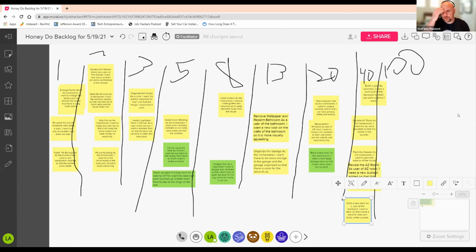Hey, Larry, I've got a question to clarify here. So the affinity that you're talking about is strictly, the horizontal axis is strictly effort. Is that correct? Yes. Okay. Yep. So just because something looks like something else, the affinity is strictly on effort, whether that be hours or time or whatever it may be. This is just on effort. This is relative effort. Thank you. It translates loosely into time and cost. It also helps us translate into something called cost of delay, which is what we're going to compute later. But I'm not going to get too much into that because we'll save something for later, right?